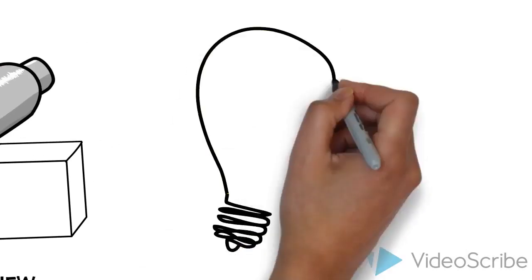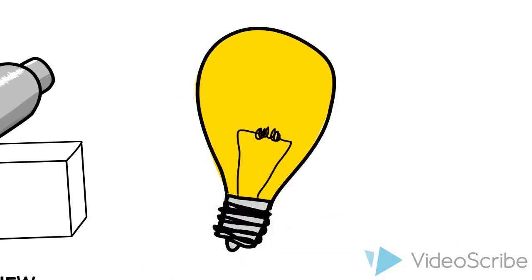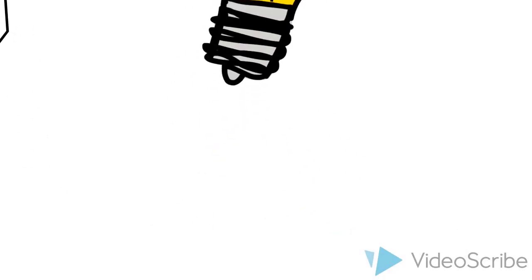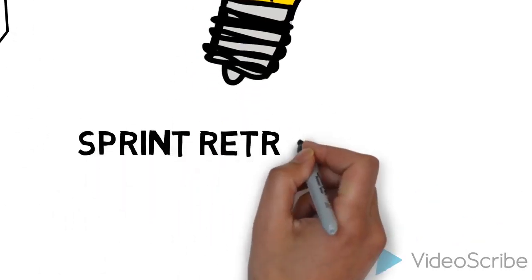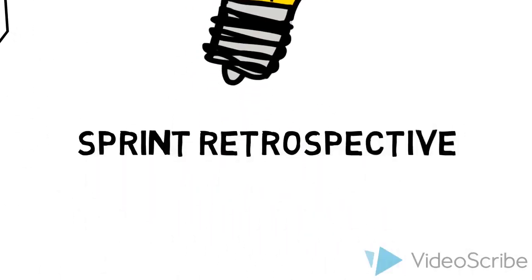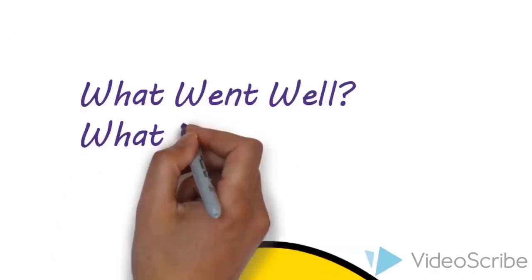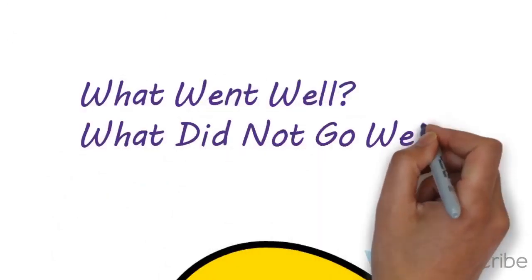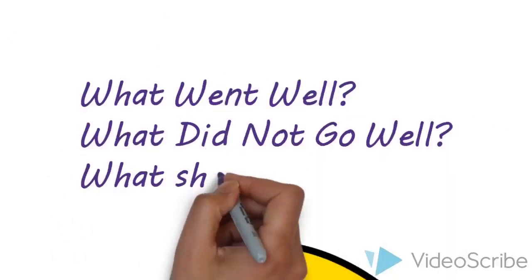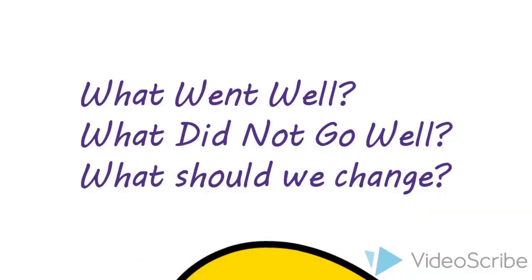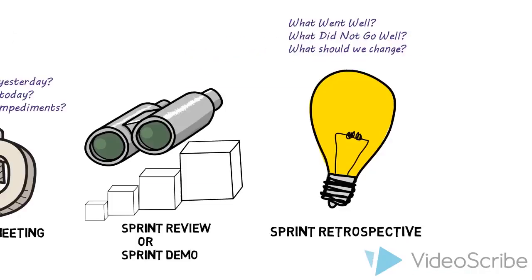In order to continuously improve, we do sprint retrospectives, where we ask what went well, what did not go well, and what should we do better next time.